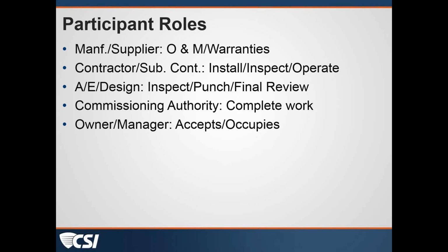I would like to make an observation or suggestion. When you get to this point in the project and you're getting all of these closeout documents, many times many of the subcontractors have completed their tasks long before and have moved on to the next job. And it's oftentimes difficult for the contractor to get them to go back and put together the O&M manuals, the warranties, or documentation that they might need from a sub that has long left the job site.